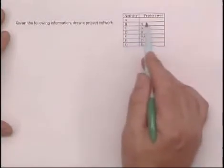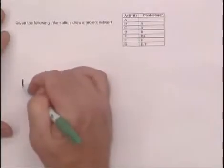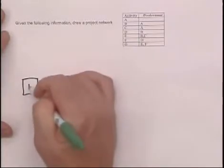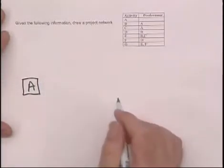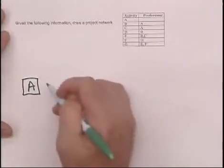And the first activity is the one without any predecessors, which is A. Draw a box there and put an A in it.